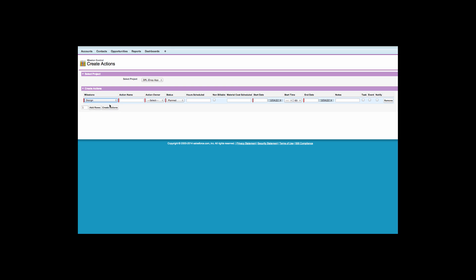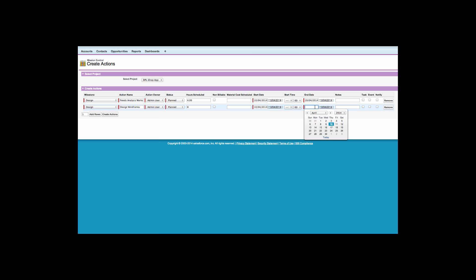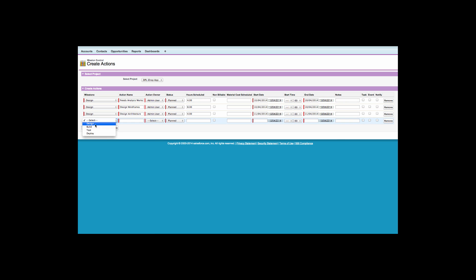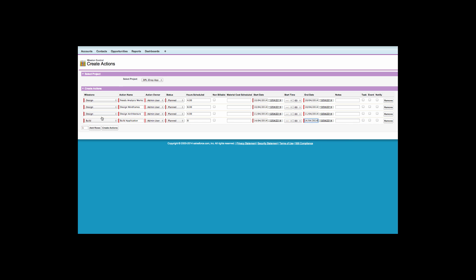From the project details screen, if I click the Create Actions button, I can begin to create individual actions for each of my project milestones. I can simply select the milestone that I wish to create a new action for and complete the details, including the name of the action, who the action owner is, the scheduled hours for the action, and the scheduled start and end date. You can also create a task, event and also notify the action owner of the new action that has been assigned to them.